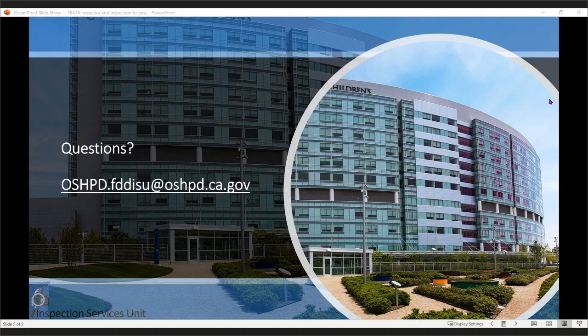Yes, this is Bert again. That shows up pretty quickly in the metrics. If you've got 30 subcontractors out in the field and everyone's up in the 90s, and all of a sudden you've got somebody down in the 30, 40%, you make sure his bar is red, absolute red as can be with a neon light on it. And if he's shameless, maybe he just says, I don't care if I'm red. If he is, you don't need him on the job site. You want somebody that's diligent and will be a team player. Peer pressure is pretty substantial on a job site. Nobody wants to be known as an underachiever.